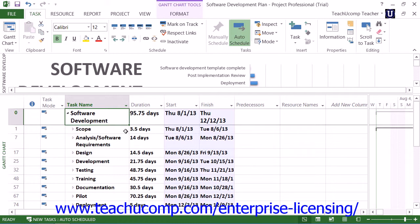The basic project plan is then often saved as a baseline for the project, meaning that it is the initial project plan. Beyond creating a baseline project plan, another great feature of Microsoft Project is that it can use effort-driven scheduling when assigning resources to tasks. Therefore, if a task would take 16 hours of work to complete, and you assign one work resource or employee to the task at a given maximum of 8 hours of work per day, Microsoft Project will estimate the duration of the task to be 2 days.